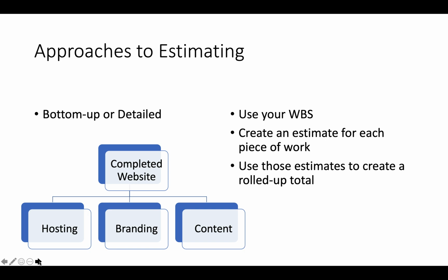And for each of the types of estimates, by the way, in a bottom-up estimate, you might look at a piece of work and say, oh, in order to have this room remodeled, we're putting in new flooring. So we're going to do a parametric estimate for the cost of the flooring. So you may find that your bottom-up estimate includes the use of parametric estimating or the use of analogous estimating. And in this way, it all works together.